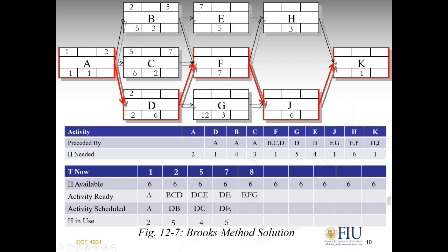However, look, I had E here and E here, so which means E started and E is still ongoing, it's ready. So I have to have E here. So you see, even though F has the most priority, G has the medium, E has the least, I have to bring E here because E already started. I cannot delay it till the end. I have to have E here. And that's why I picked E as the first.